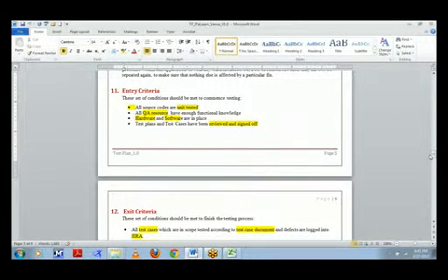One of those criteria is that every module must be unit tested before we start testing, every QA person should have enough knowledge about the application, and all the hardware and software we need should be available. And test plans and test cases must be reviewed and signed off by the QA manager and required people.